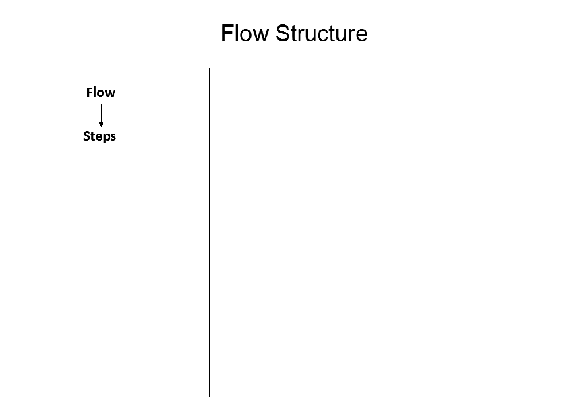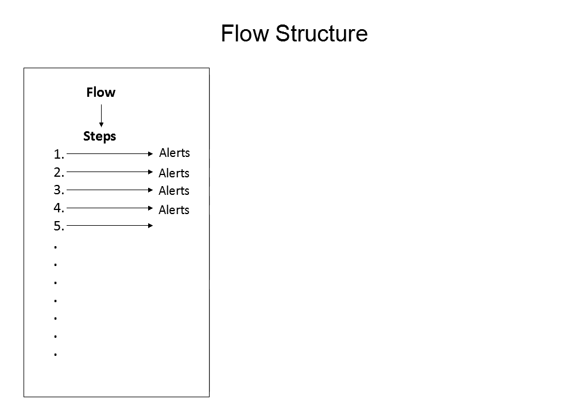flow. In a flow, the user has to define the steps, which will contain the number of steps. And these steps should be completed to mark the whole task as done. These steps may be dependent or independent of each other. Each step can contain the number of alerts that the user wants to send. Alerts will help the user to do the work on time and to avoid delays.